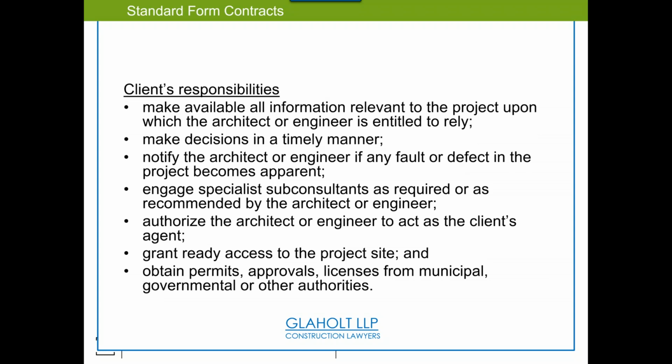Inside these contracts, you start to state who's responsible for what. And this is interesting because think about existing conditions modeling and existing conditions validation. The client is responsible to make all existing stuff available to architects and engineers. Okay? And then we need decisions. What if there's a delay? But what if the delay is because the client can't decide what they want? It's not because of BIM. It's not because of delivery. It's all about decision making.